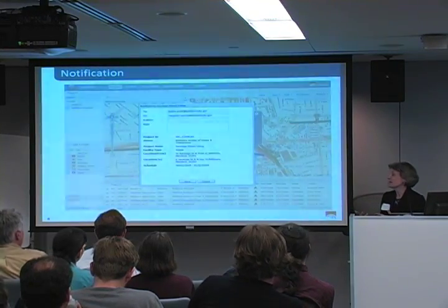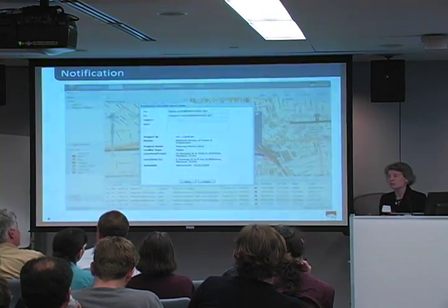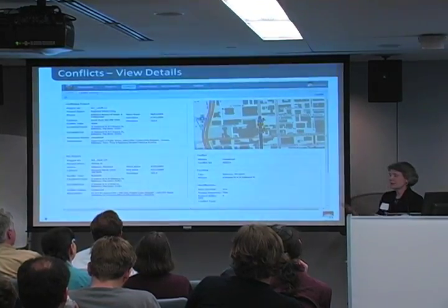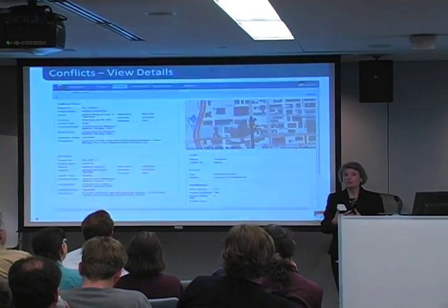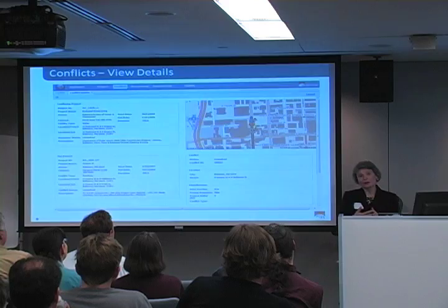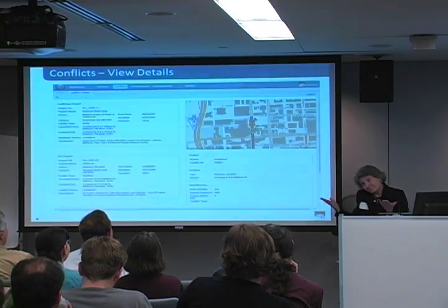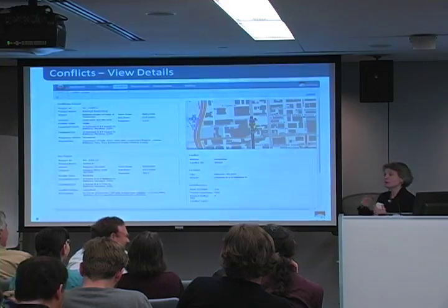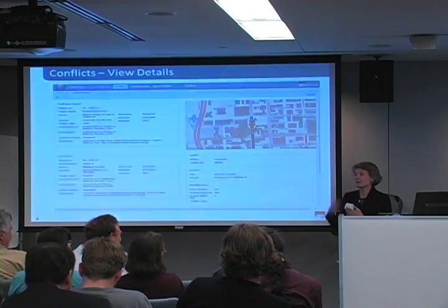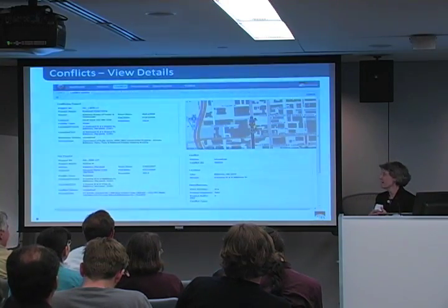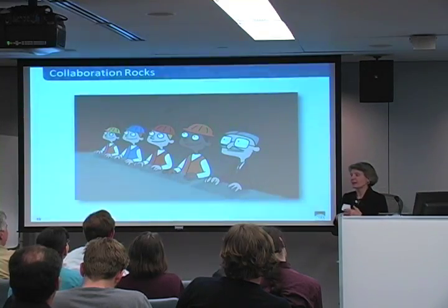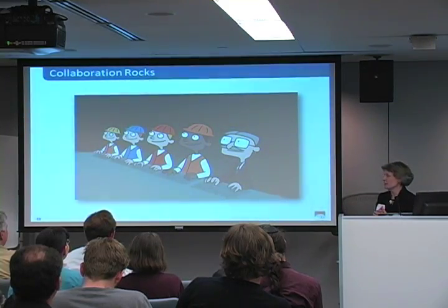And the whole idea is to try to create some resolution about it, so that typically the kind of resolution would be that all the people who dig go first. Water and gas dig first, and paving goes last. Seems simple enough. You know, municipalities, there are 6 or 7 utilities per municipality. And for the utilities, they've got like hundreds of cities in their service area.